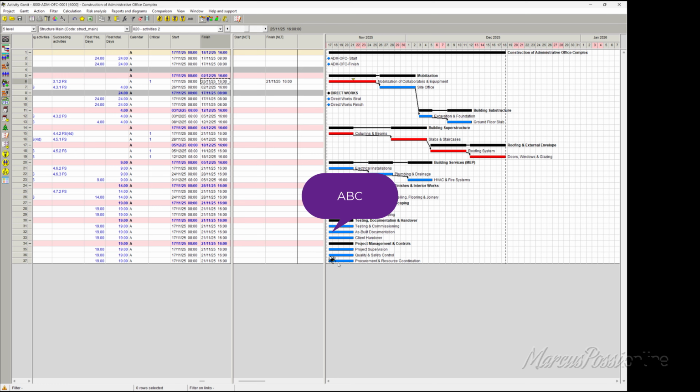In projects, when you make a must finish, everything comes into a mess here, and the beginning comes to the past sometimes, and it's a complete confusion. But you can see that your deadline is here.